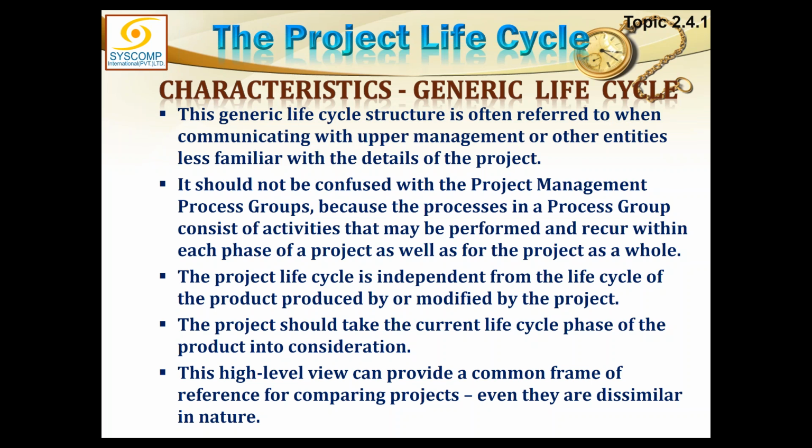Every phase has its own deliverable, product, service or result, and every phase has to be treated like a mini project. It has to be chartered, it has to be initiated, planned, executed, monitored and controlled, and ultimately closed. Therefore, there is a lot of iteration in every phase. Every phase will go through this iteration.